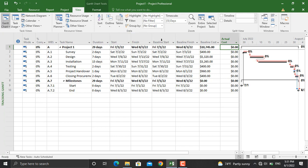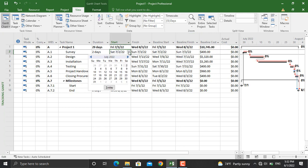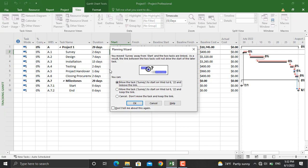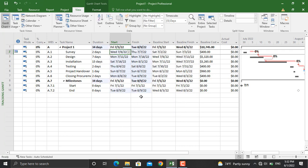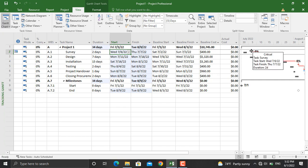So in here you have the actual start, the actual finish, the baseline start, the baseline finish. Now if I go here and change this actual start, for example, to another date—let's go to 6th of July—and we will click OK, as you can see the baseline will stay in its place and our original start date will move to another date.